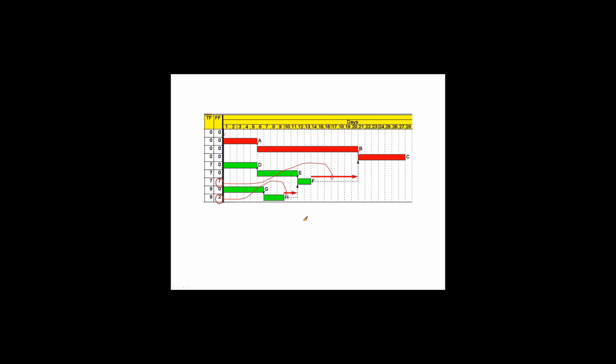So if you're on E and the project manager starts hollering at you, you might say, hey, get off my back. I've got a bunch of total float. What's the problem? Well, the problem is that the resources that were planned for activity F, and as for all the activities, were planned to be conducted on days 12 and 13.